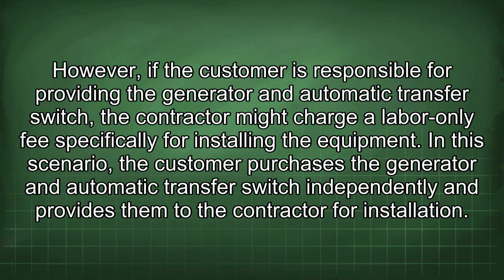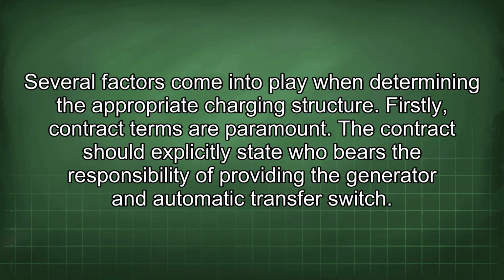However, if the customer is responsible for providing the generator and automatic transfer switch, the contractor might charge a labor-only fee specifically for installing the equipment. In this scenario, the customer purchases the generator and automatic transfer switch independently and provides them to the contractor for installation. Several factors come into play when determining the appropriate charging structure.